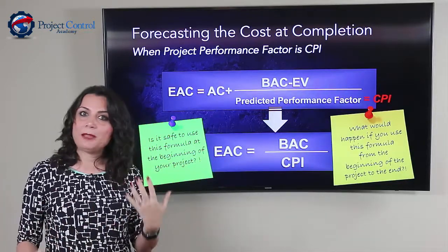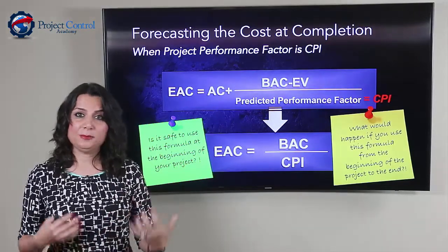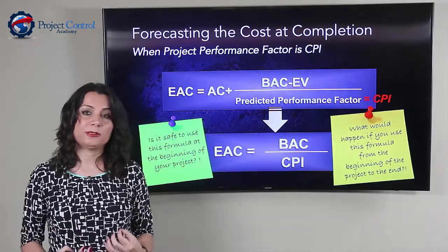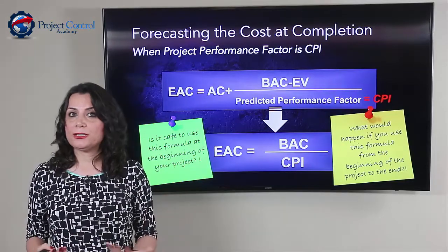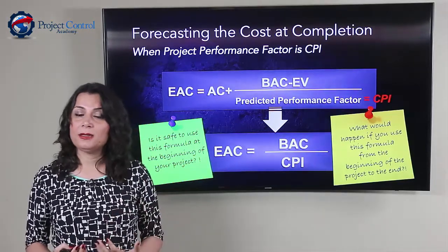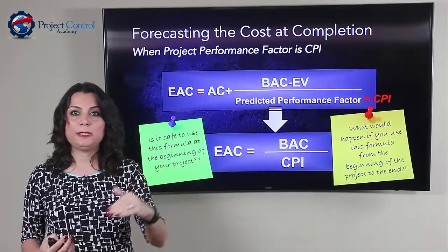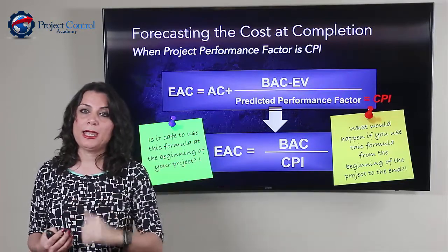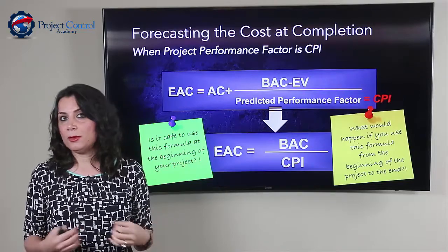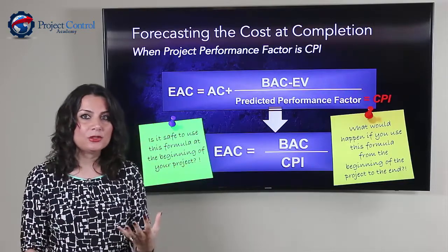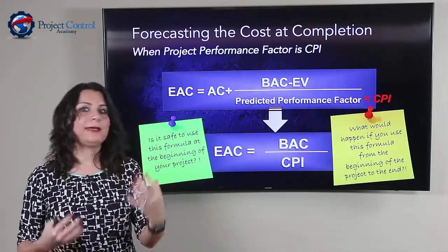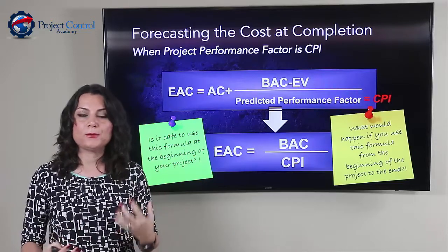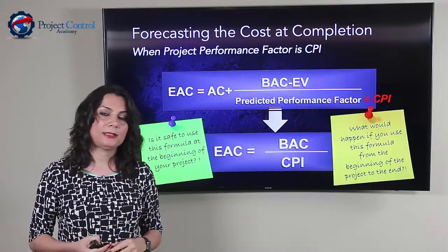So we didn't claim that much progress. So our CPI, or cost performance index, was quite low. In a reporting cycle, it was, I think, 0.7 or something, and it kept dropping down in every reporting cycle because we were not really delivering anything tangible. We were still figuring out the scope and how to continue with this project.